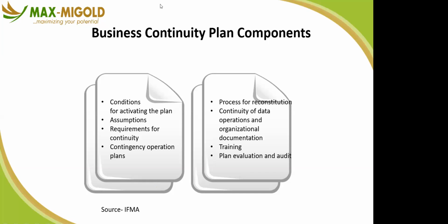So remember during my health and safety talk, we talked about loss prevention plan, LPP. Before we spoke around, we said there is the planning phase, there is a permitting phase, and there is the job execution phase. So what is being asked is that before you even give the job, when you are doing your RFP, request for proposal, why don't you ask for all those things at the beginning, so that you can even use that to disqualify some people.